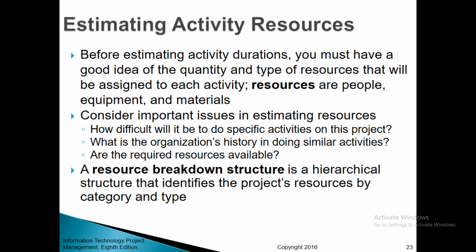Estimating activity resources. Before estimating activity durations, you must have a good idea of the quantity and the type of resources that will be assigned to each activity. Resources are people, equipment, and materials. Consider important issues in estimating resources. Number 1, how difficult will it be to do specific activities on this project? Next, what is the organization's history in doing similar activities? And third, are the required resources available?